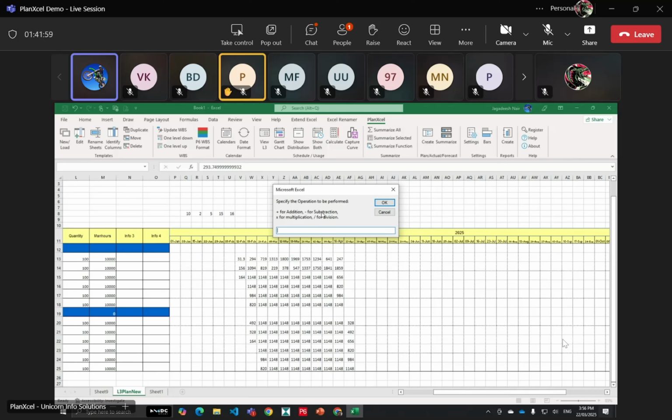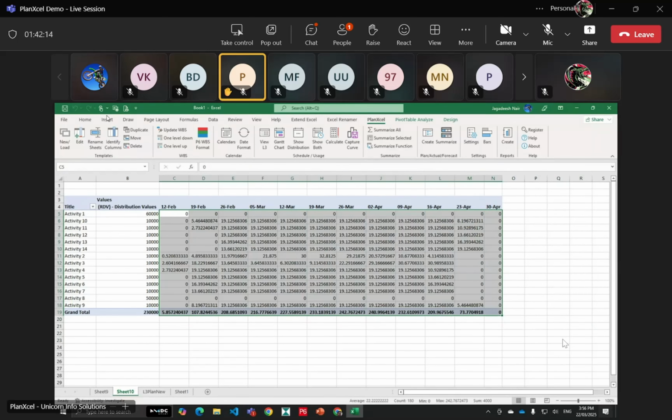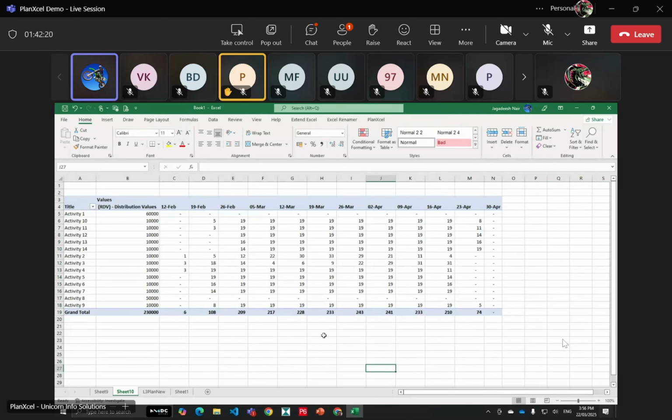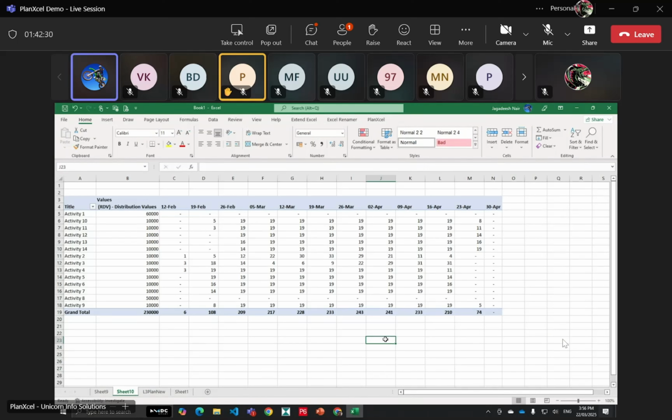So here we are going to divide. Just put the slash for the division. If you're saying around 60 hours I'm working, then this is a straightforward manpower histogram, which will tell us how much manpower we need to deploy in order to be within this schedule, based on the man hours we have given here. So this is much handier with respect to how we want to dissect it. The same is applicable when you want to create S-curves, which we'll see in detail now.